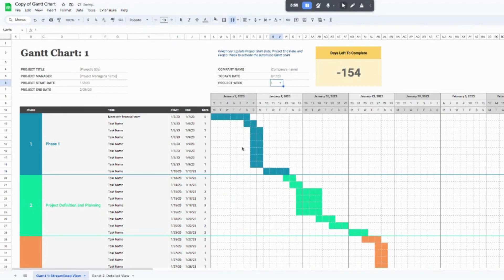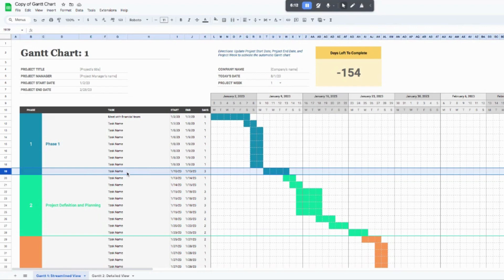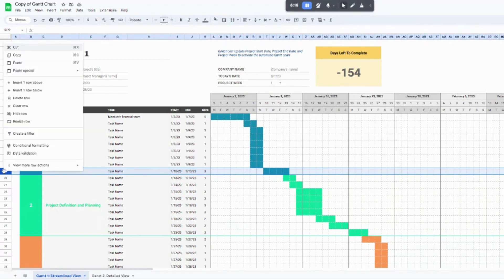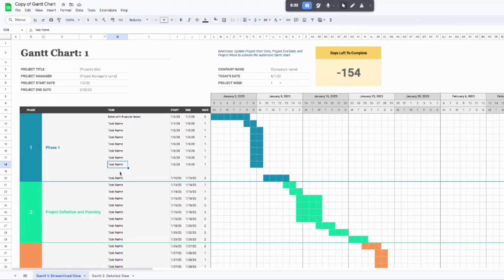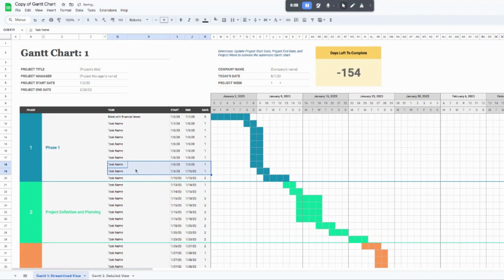Now say you want to add another task. Click on the very last row — the last task in your project phase — right-click, and select 'Insert one row above.' It's really important to insert above, not below, because above keeps it in the same phase color. The new row will appear blank, so come up to the row above it, select columns G through K, find the small circle handle in the corner, hover until you see the plus sign, and drag it down. That copies all the formulas and activates the Gantt chart for the new row, and then you can rename it and change the dates.